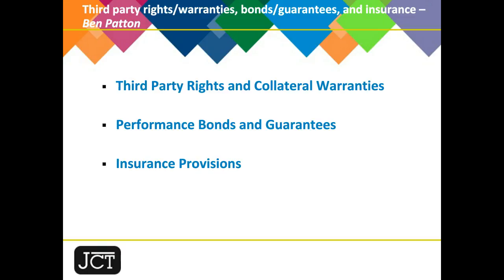In relation to subcontractors, however, it remains up to the employer, of course, to specify the nature of the third-party rights, and therefore it is necessary for the employer to specify in the rights particulars, as they're now called, the levels of PI cover, or, where appropriate, product liability cover, that the contractor is to then require from relevant categories of subcontractor under their respective subcontracts.